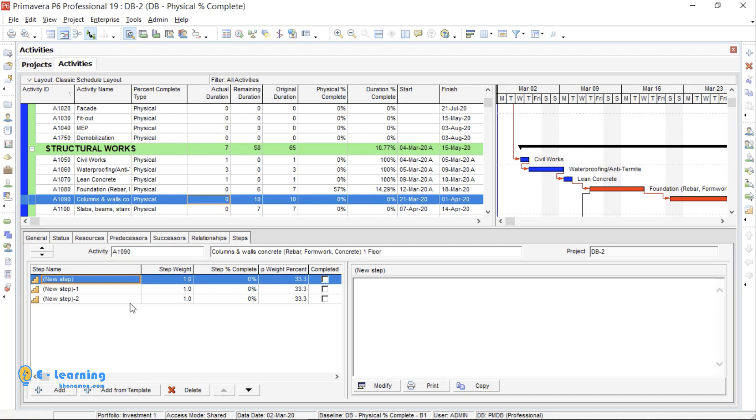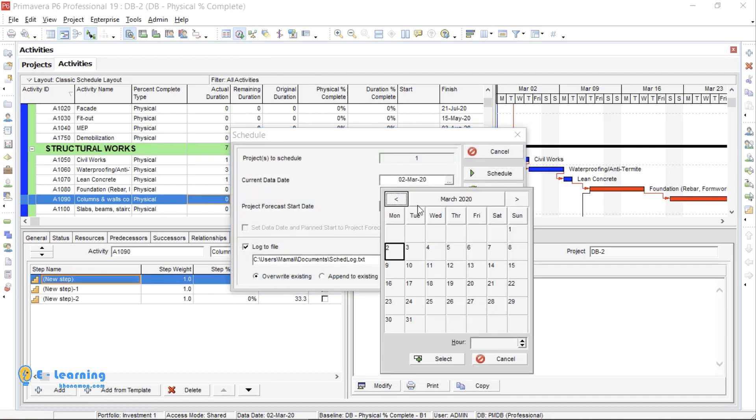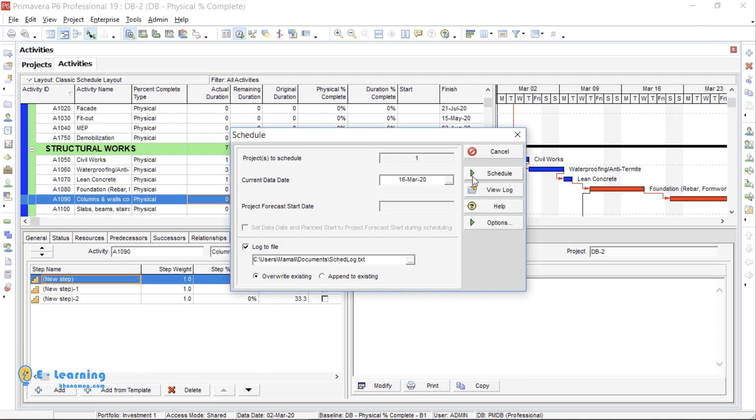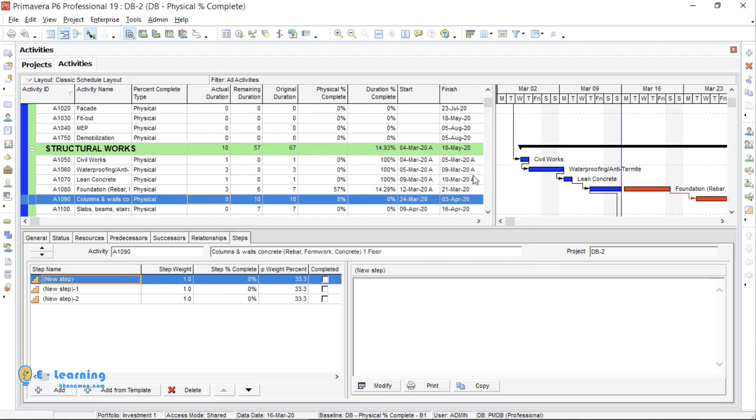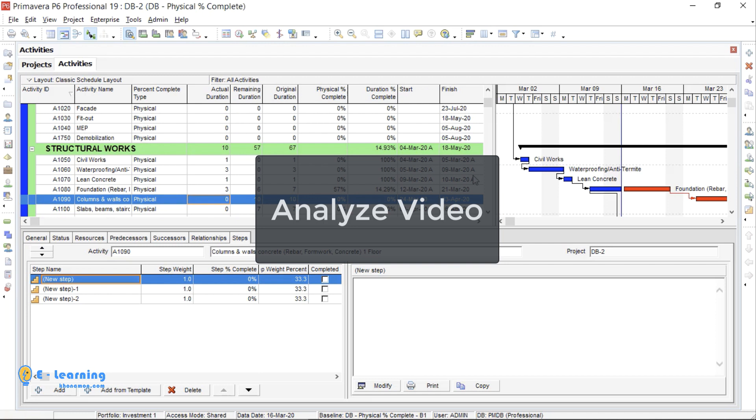After adding steps to all activities and assigning baseline, it is time to reschedule the plan. Now, suppose it is 16th March and you want to update your schedule. From Schedule or F9, choose Data Date. Here, our reporting date is 16th March. Select it, then Schedule. Then, you can check the date and analyze it. How to analyze, let me explain in Unit Percent Complete.